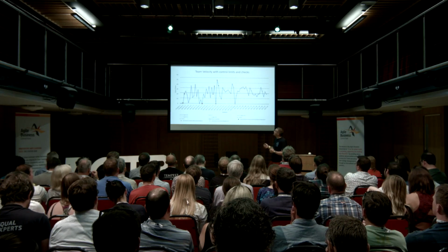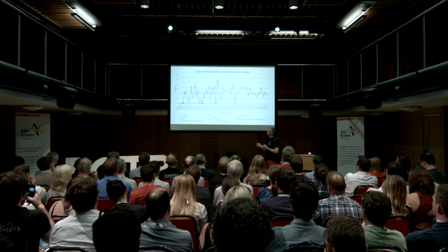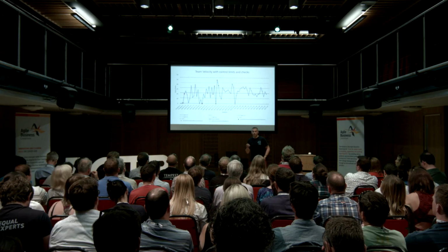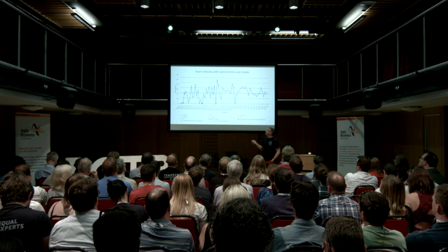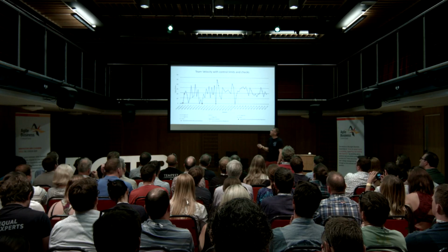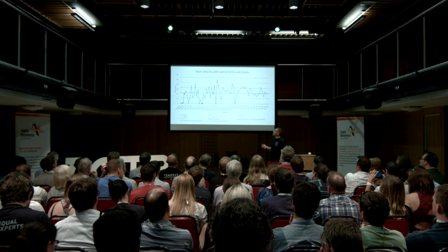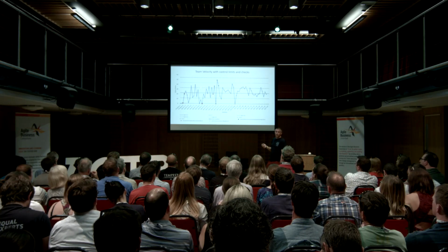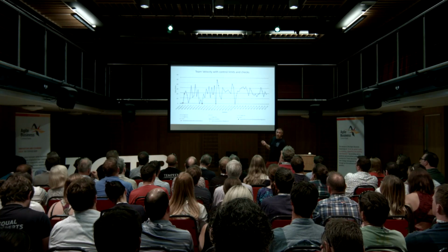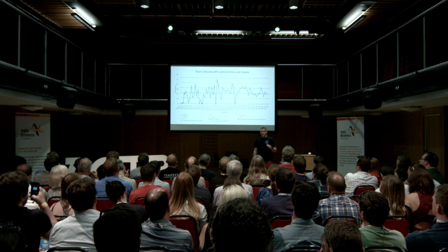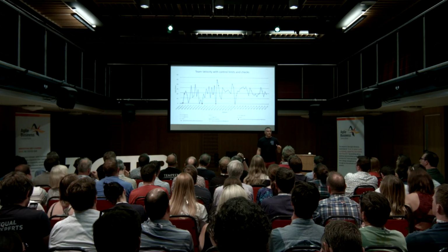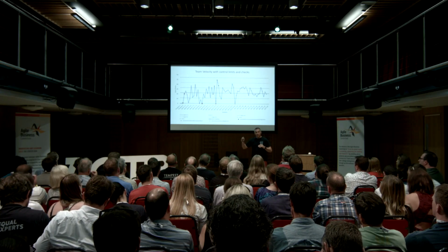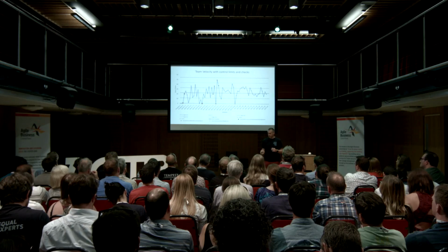These diamonds got flagged up, and these are quite an interesting abnormal pattern. They show that we've got 14 points in a row where the points alternate up and down. It doesn't care whereabouts on the chart they are. It's just saying this point is higher than this point, and then the next point is lower, then higher, then lower. That's very unlikely to be a random event, jumping up and down over time like that.